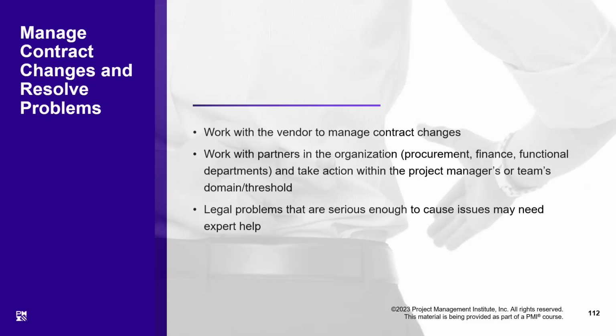Basically, we will have the same change control mechanism which we have for the project. We will try that the same can be applied to the subcontractors. But the question is, subcontractors are not bound by your rules. They are separate organizations. So what they are bound by is that they have signed a contract. So when we are signing a contract with a subcontractor, we must establish the rules of the game.